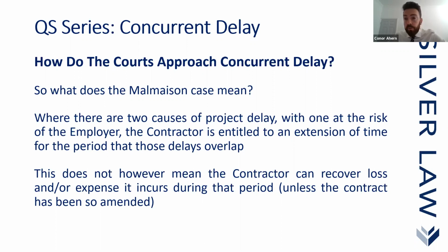The relevant events deal with time, the relevant matters deal with money. If you have an event that delays the overall completion date, unless that is also included in your list of relevant matters, you will not be entitled to your loss and expense. It's a very important point, and one that often gets confused, because it's assumed that because you've been delayed you're entitled to your costs, but that's not always the case.